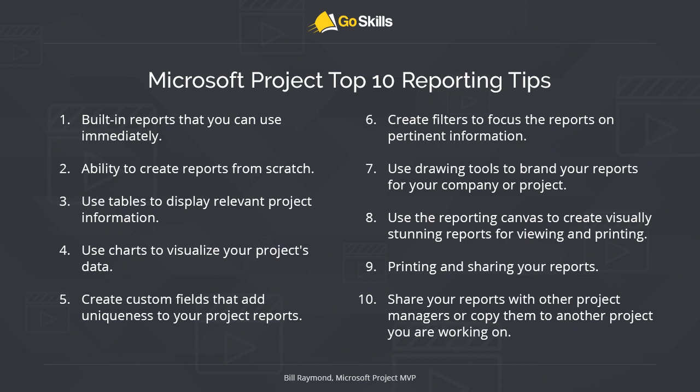We created a custom field that allowed us to add uniqueness to our report. That was the 30-day planning window. And then we created a filter to use that custom field so that we could look at just information that was pertinent to the consumer of the report. We also used some drawing tools to brand our reports. Remember, we added a logo, we put some headers on top of all of our charts and graphs. And we also used that canvas to really make it look good.